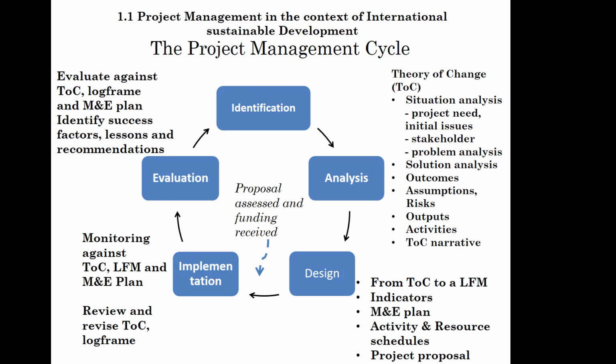It's basically a top-down analysis that we do, starting with the overarching problem that we identify there, the problems that are contributing to this overarching problem, and the solutions then needed to overcome all these problems. The outcomes that the project proposes to achieve. Only after we know which outcomes we are aiming at are we able to identify the appropriate outputs and the activities needed.